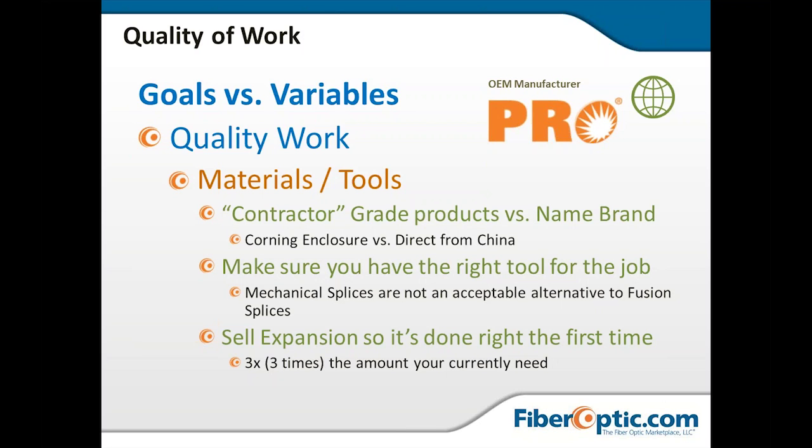It's so much less expensive to have it pulled in. The labor cost is really going to be a huge driver in any project. So the extra 12 or 24 fibers that you may get if you were really only needing 12 now is really pennies on the dollar compared to the labor rate it's going to cost for someone to come back in 12 months or 18 months to reinstall that.